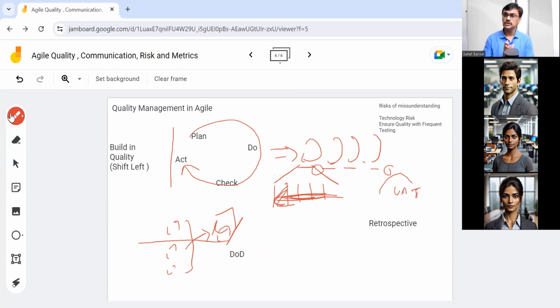So the definition of done talks about some internal quality checkpoints. For example, you may say the code review should be done. It may talk about integration being done, defects being resolved, data being migrated. Maybe the user manual has to be updated, and maybe a customer demo has been given. That could also come, but usually it only comes when you have very frequent releases happening. Else that will happen at a later stage, which is a risk also, but you understand that.